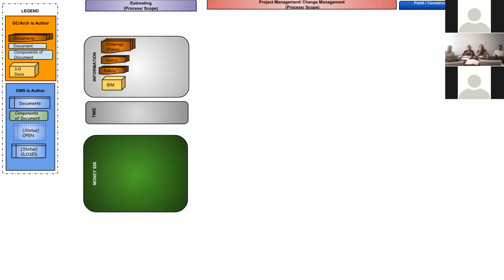So when they put all the models together, are there any parts and pieces that are in the same place at the same time? And how does that work, and who needs to move and adjust? The reason why general contractors and owners prefer that is if they can alleviate the conflicts in advance, it allows the building team, the field, when they build, to work unconstrained, which means the projects are more profitable and less likely to have any schedule delays.